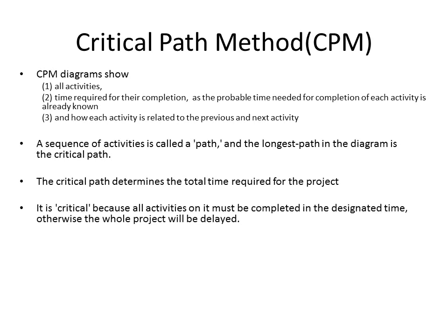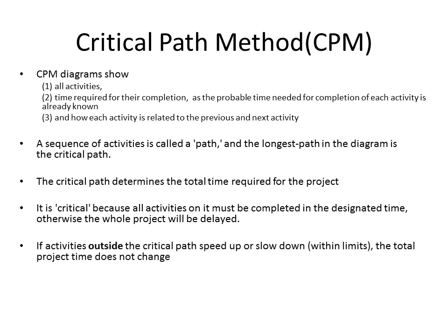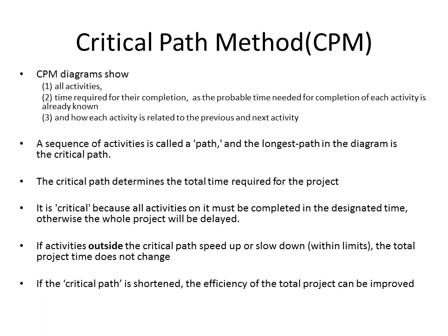The path is called critical because all activities on it must be completed in the designated time, otherwise the whole project will be delayed. For any delay in paths which are outside the critical path, or any speed up in these paths, the total project time will not change. But if the critical path can be shortened, the efficiency of the total project achievement can be improved.